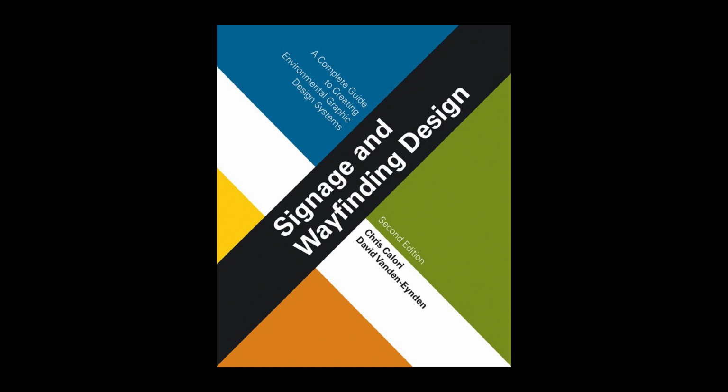Coordination meetings are important tools during the observation phase, starting with a fabrication kickoff meeting at the beginning of the phase, which the client's contract rep, the fabricator, and the designer attend, along with any other interested project team members, such as the client or project architect.